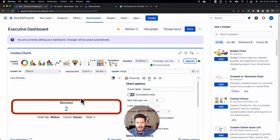Now the next thing I want to do is add another segment and start adding columns. I want to add an extra column — I see the percent, but I don't care about that. I just want to know how many issues are assigned to each person. I'm going to come to Add Column and now I'm going to do an average — I want to do the average of story points. By each individual, I want to see how many story points they're tackling. If you're tying it back into a simple search, it'll give you greater value because for a more specific view it'll show that new average. I can combine my assignee breakdown and story point average by each user to get that insight all in one view.